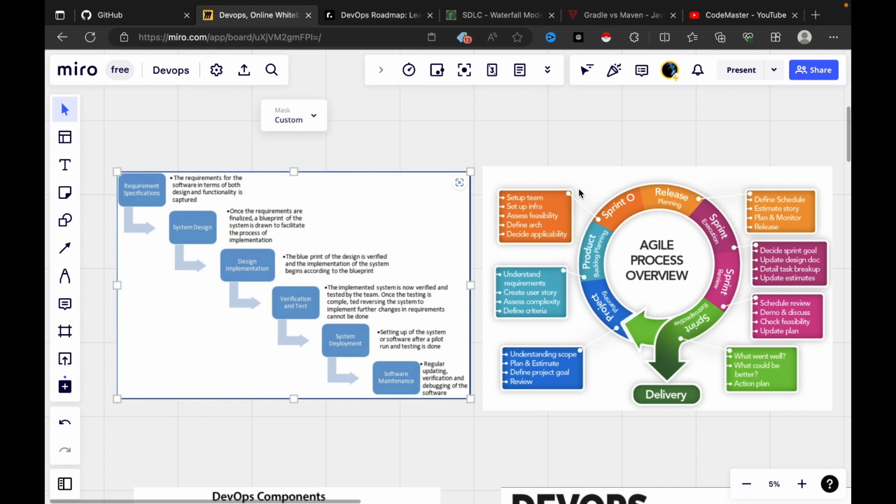And the next one would be sprint planning. We pick a few things from the list that we think we can do in a short time, usually 2 to 4 weeks. This short time is called a sprint. And the next one would be sprint execution. We start working on the things we picked. We design them, write code, and test to make sure they work. And then the testing part. While we're working, we'll also test. We want to catch any mistakes or problems as soon as possible in this part. And then we'll review.